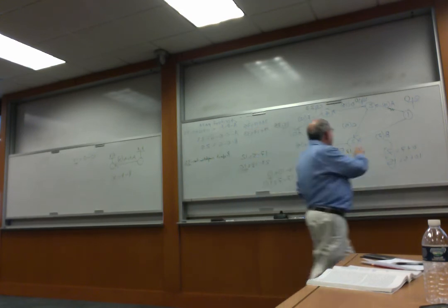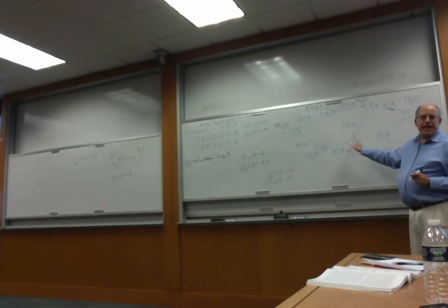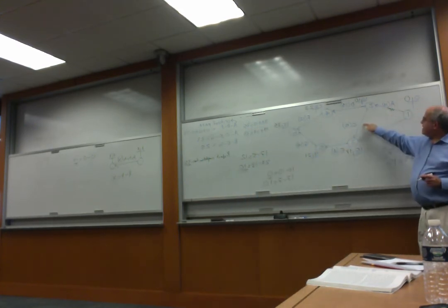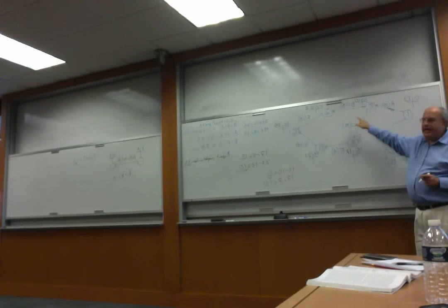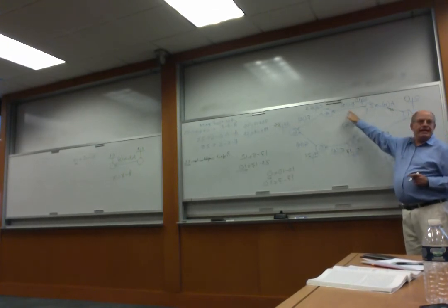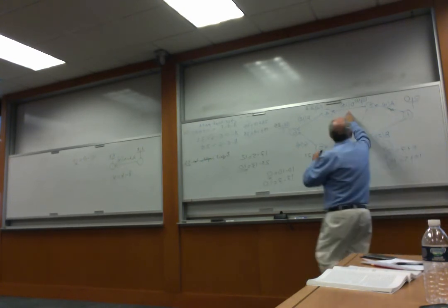So B is not on the critical path because of the unequal numbers. Next is C. Is C part of the critical path? For the same reason, the answer is no. Even though we have equal numbers at 2, it ends at 3, unequal numbers. Next is D. Is D on the critical path? Yes, it is. All 3 conditions are true.